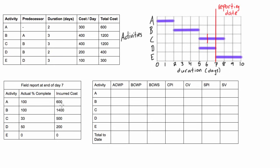Activity D is 50% complete by end of day seven. We were expecting it to be fully completed based on our original plan, but only 50% has been completed — we can shade that in. Activity C has also only been partially completed. Activity E hasn't started yet, which was expected, and it's good to note we're not ahead of schedule by having already started activity E.